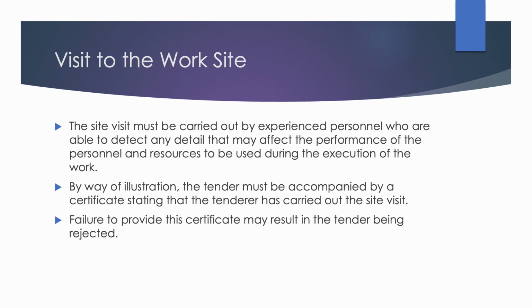Site visit. The site visit must be carried out by experienced personnel who are able to detect any detail that may affect the performance of the personnel and resources to be used during the execution of the work. By way of illustration, the tender must be accompanied by a certificate stating that the tenderer has carried out the site visit. Failure to provide this certificate may result in the tender being rejected.